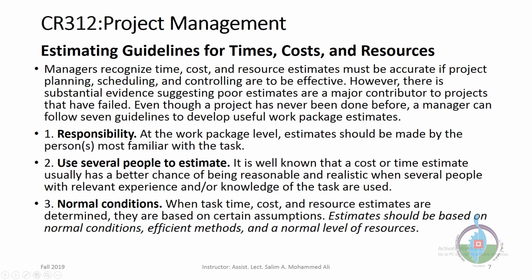The first one is responsibility. At the work package level, estimates should be made by the persons most familiar with these tasks. We visited the work package level in the WBS structure. It is the lowest level. You should ask the people who are most familiar with this task about the estimates. Usually the estimates are time, cost, and resource.